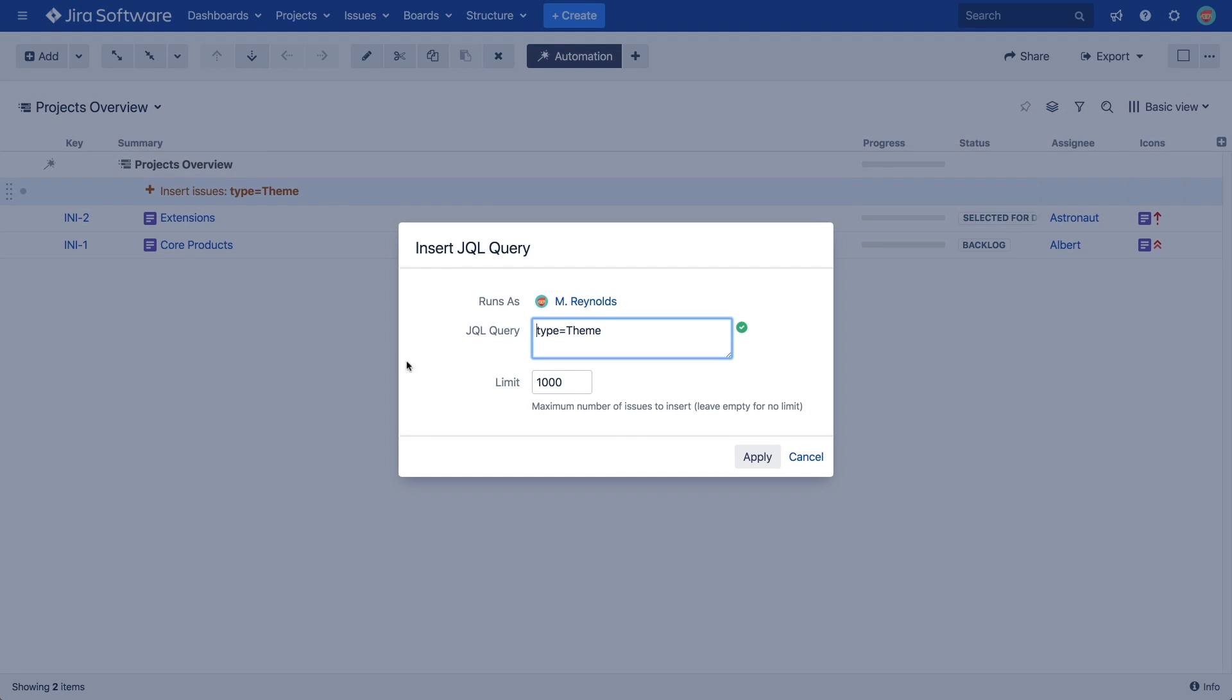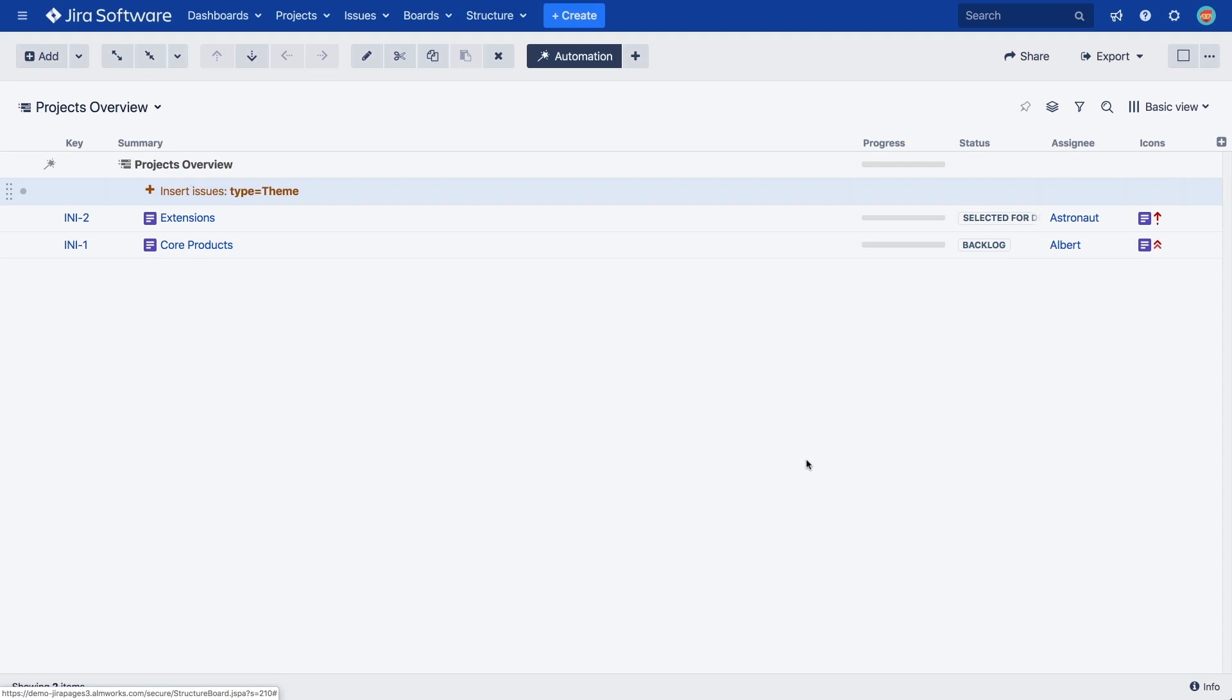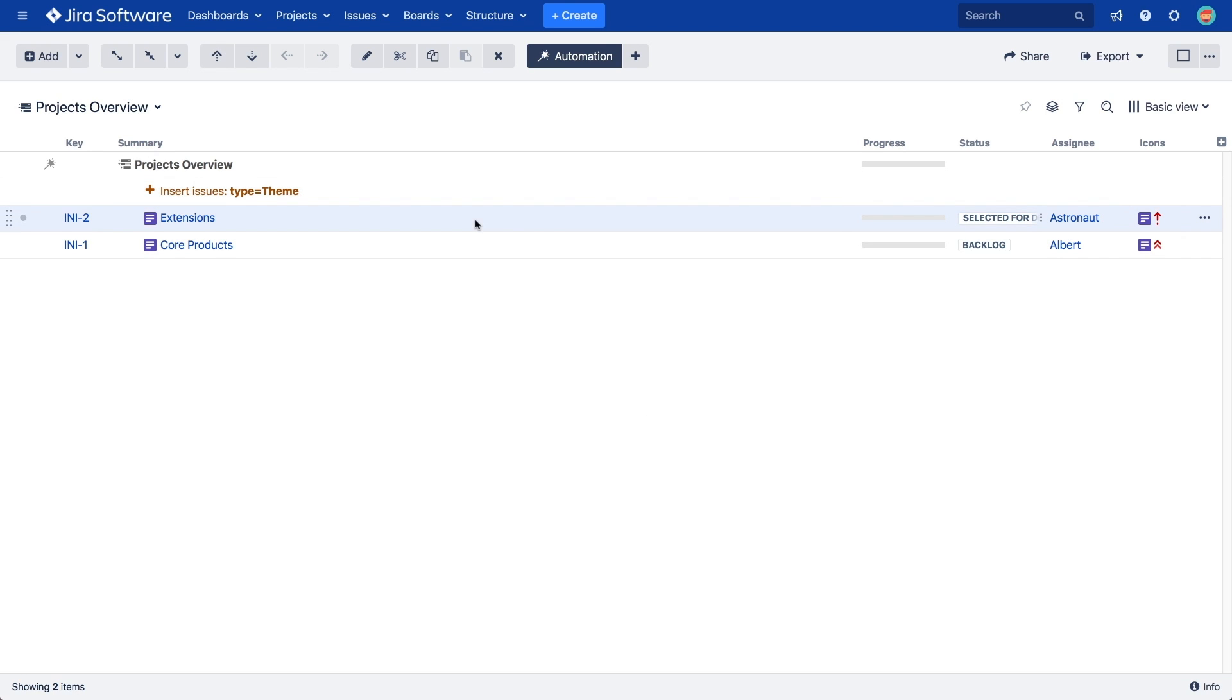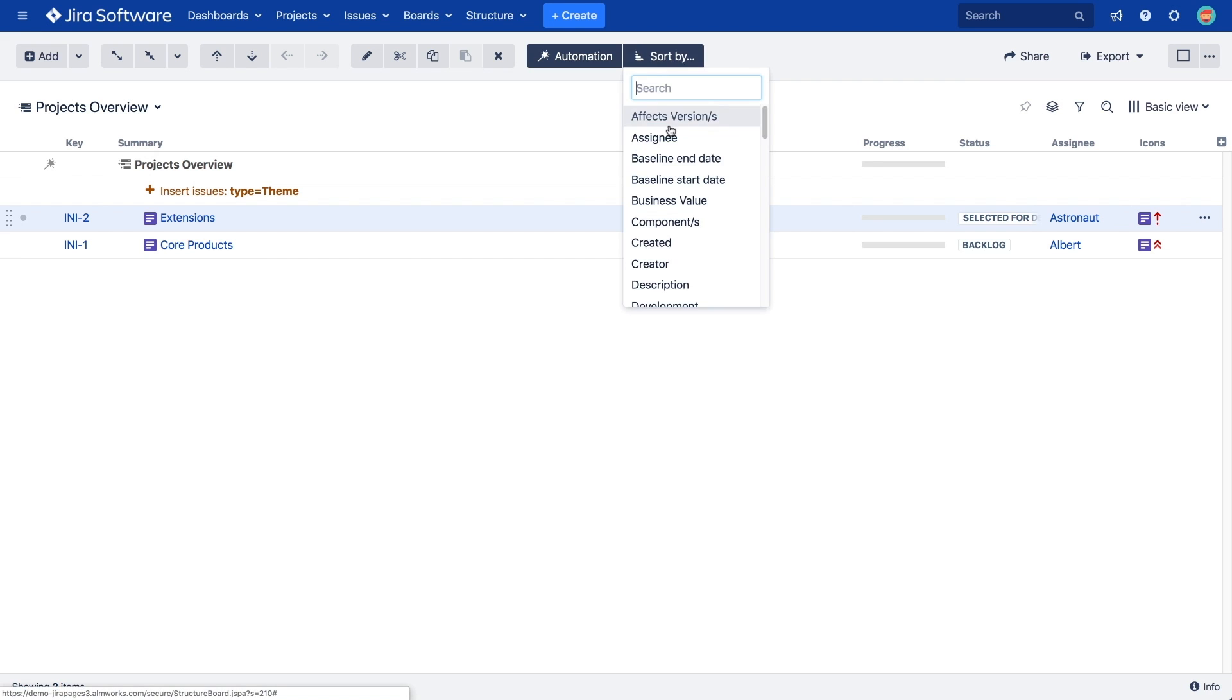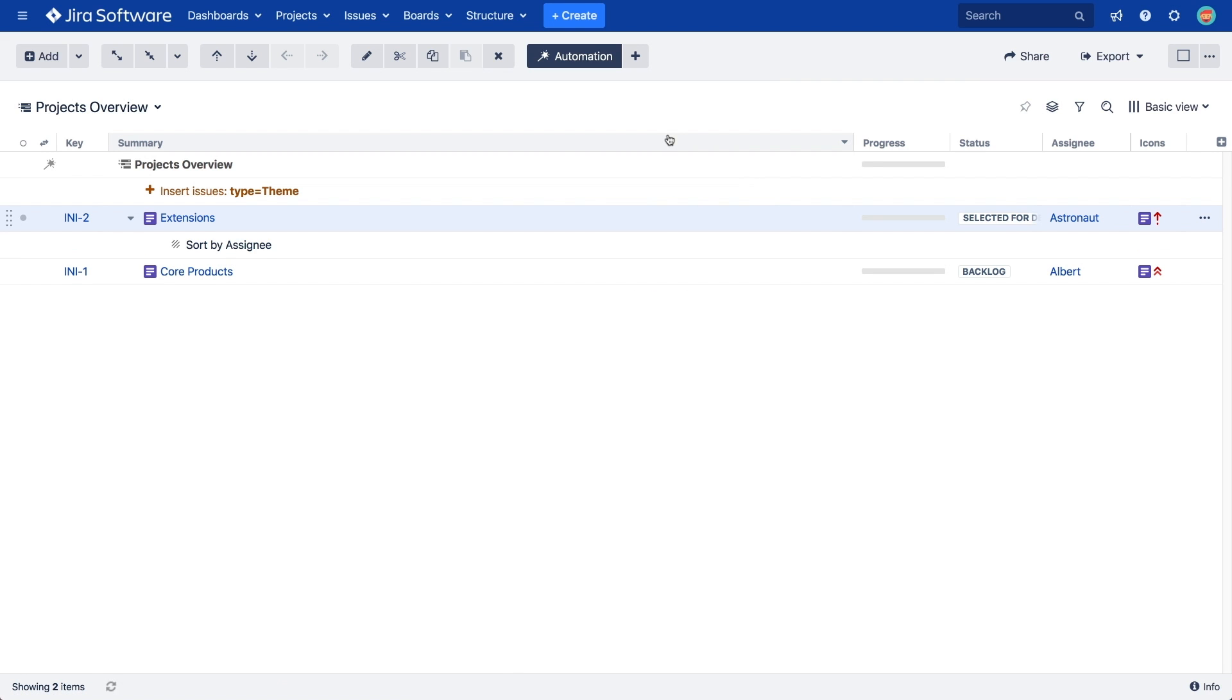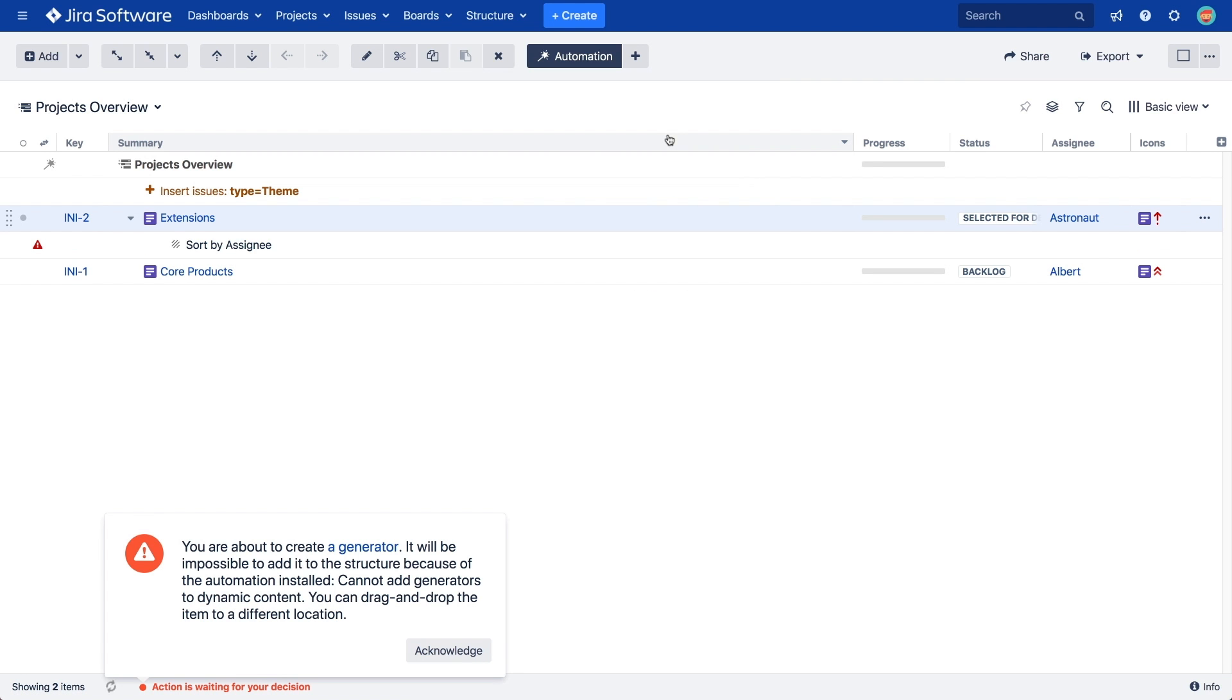In automation editing mode, you can see how the scope of a generator is defined by its position in the structure. You can add them under the root element to affect the entire structure, or under manually added issues and folders for a limited scope. It's important to note that you cannot add generators under items that were added by another generator. An error message will appear if you accidentally try to do this.